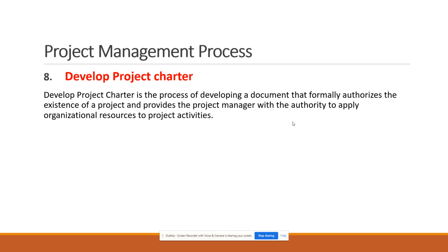Once this project charter is signed, only then does it authorize the existence of the project, and it gives the project authorization to use the company's organizational resources. Developing the project charter is the duty of the project sponsor, who needs to prepare it, sign it, and give it to the project manager. Maybe the project manager will help to do the project charter, but theoretically speaking, it should be done by the project sponsor.